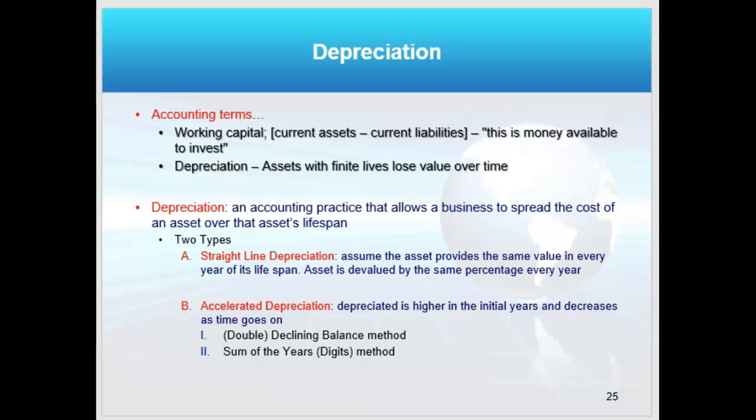As a project manager, in discussing my budget, I also want to be aware of depreciation, right? Because I can write off the costs of some items over time. Depreciation comes in two forms for the exam. Straight line, so it's just $50 if I have a $500 tool, a crane, over 10 years. I'm going to depreciate $50 a year, straight line every year. Accelerated comes in two types: double declining balance and sum of years digits. Just know that depreciation accelerates up front.